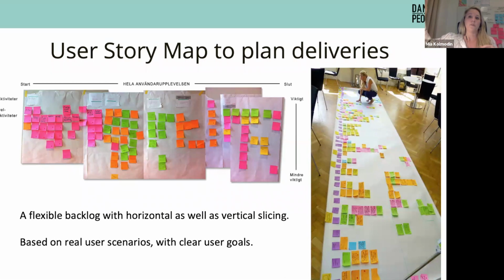the release goal. So depending on what I, as a product owner or chief product owner or product manager, define as our release goal, the team or the teams can pull up things from the backlog and then say, these are things that together will take the customer through the process and solve some real problems. And they can continuously deliver these things. So this is a super good method from Jeff Patton. Maybe you have used it. You can see me sitting on the floor there with a big plan for the Swedish Opera. It's many years ago.